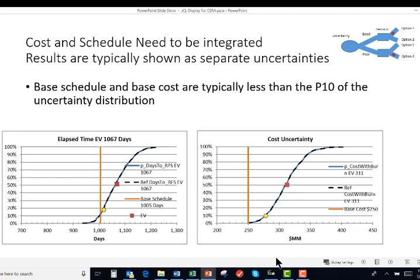As expected, in most cases, this baseline cost is always in the P5 to P10 range, sometimes even less, as shown here in this cost.